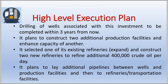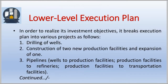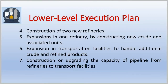The lower-level execution plan breaks down into various projects as follows: one — drilling of wells; two — construction of two new production facilities and expansion of one; three — pipelines from wells to production facilities, production facilities to refineries, and production facilities to transportation facilities; four — construction of two new refineries; five — expansion in one refinery by constructing new crude and associated units; six — expansion in transportation facilities to handle additional crude and refined products; seven — construction or upgrading of the pipeline capacity from refineries to transportation facilities.